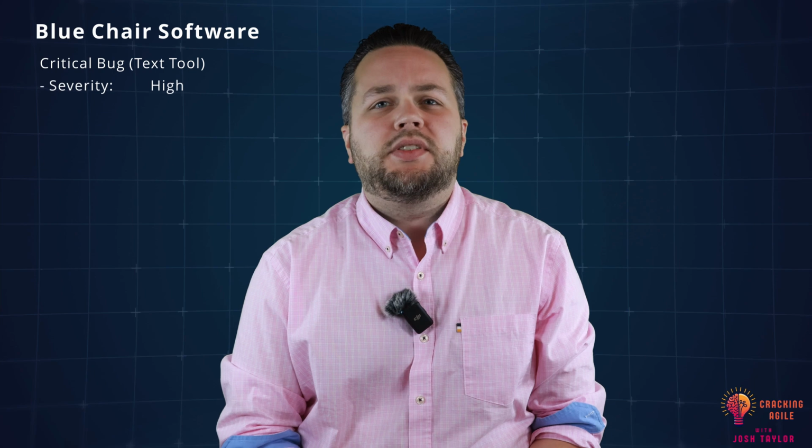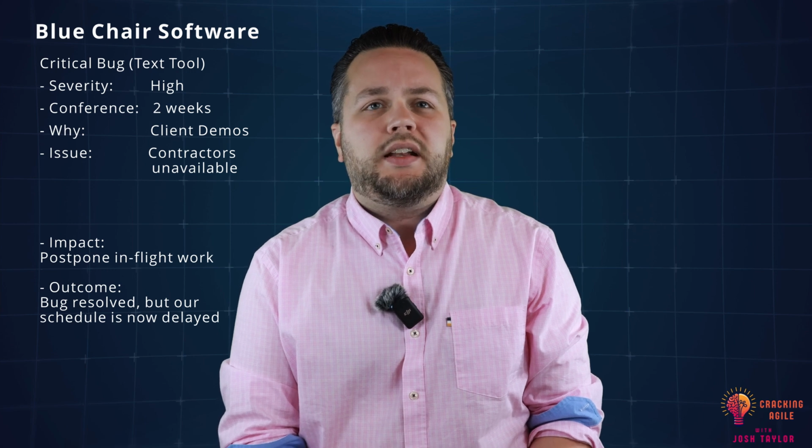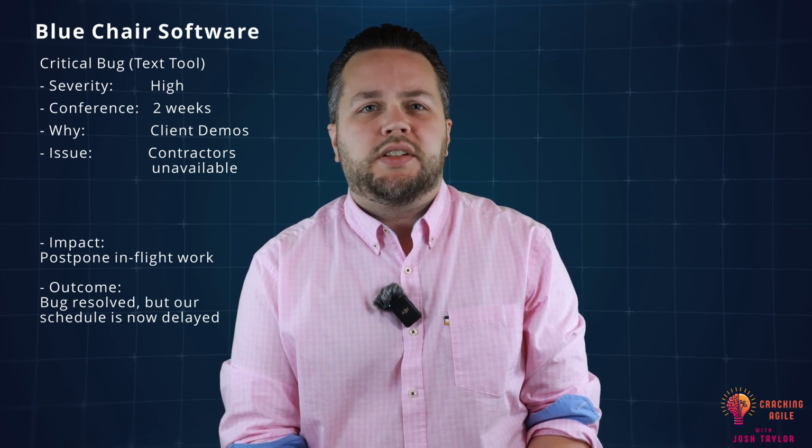Let's think back to that critical bug we were mentioning earlier. The team is going to a conference and wants to provide demos to potential clients, but there's a bug with the text tool. We weren't able to transfer that risk to our external services team, so we need to postpone a feature that was under development in-house to ensure that we had a stable app version with a functional text tool at the conference.